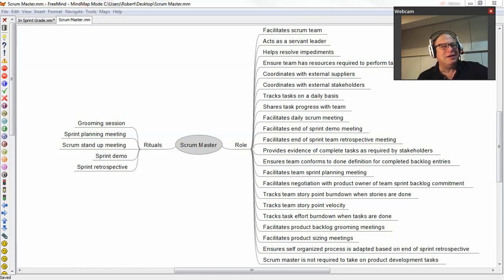There are Scrum stand-up meetings, which take place every day during a Scrum iteration. Stand-up meetings are meetings in which the progress of the team is looked at, reviewed. Every task that's ongoing is discussed. It's not a detailed meeting, it only lasts a few minutes, but in it, the Scrum Master actually asks about every task and every person, what task they're doing, what task is complete, what tasks are next. So they're really looking at the project from the point of view of tasks.